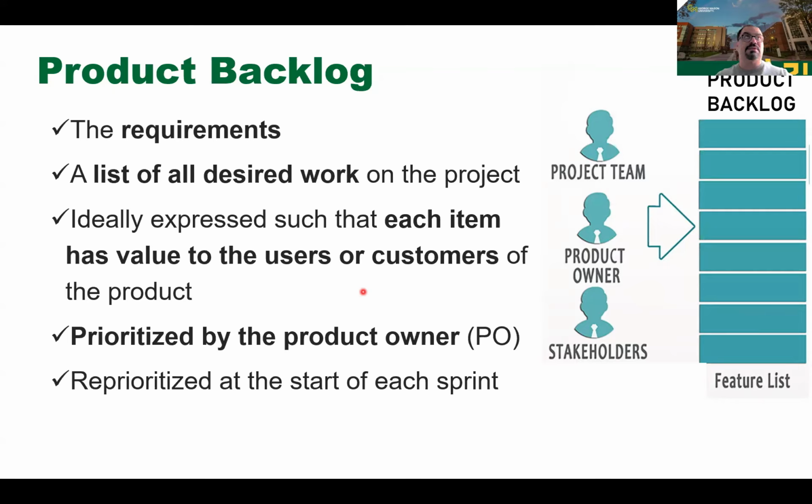The user story must be something like, okay, as a stakeholder, I want my system to have at least 99% availability, for example. And after, when you create the sprint backlog, you transfer this 99% availability into testing, design creation, the threat modeling, and other things. Okay?